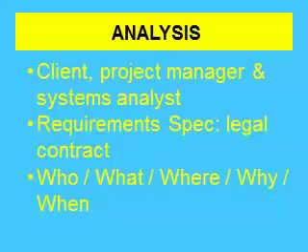And most of the analysis document is generated through who, what, when, why, and where questions, the answers to which should be documented by the system analyst in the requirement specification. There are other ways of gathering information as a system analyst: through interview, through survey, through questionnaire, through observation and reading up on the existing document, or reading project documentation, and through expert knowledge.